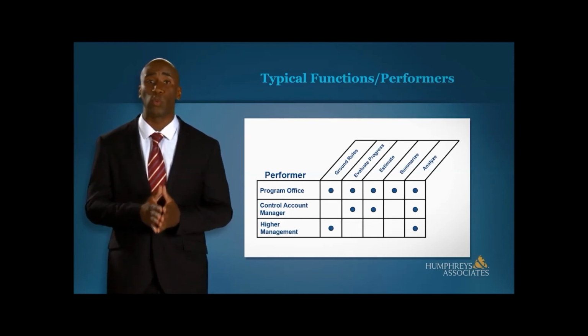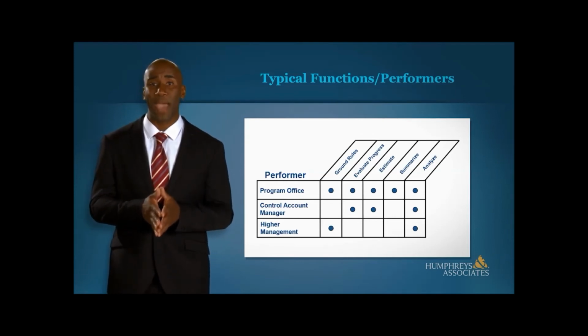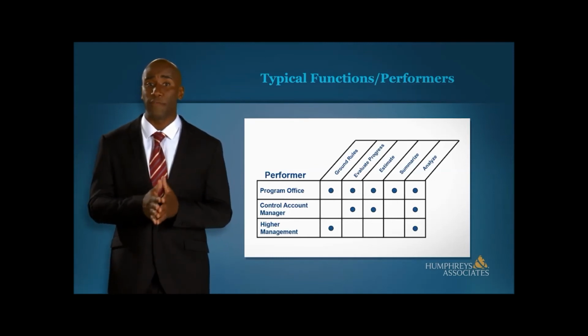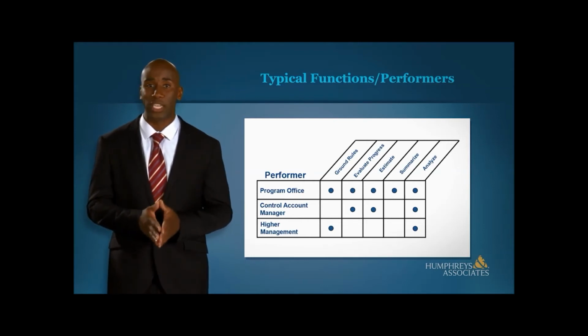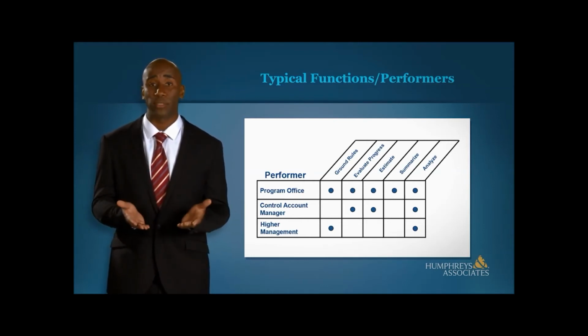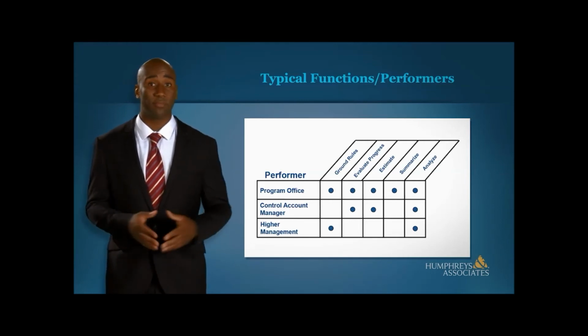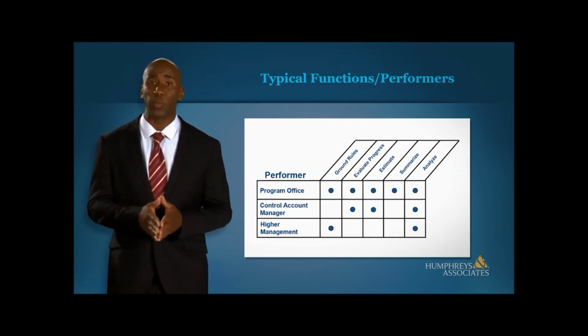This should include important scheduled dates, such as a critical design review, major delivery dates, and contract milestones. Any risks in the schedule that could impact the EAC should also be documented. Then, other factors need to be considered, such as what rates will be used. Will a fiscal year boundary be crossed because of the scheduled forecast dates? If the rates are going to change, how much for increased salaries? 2%? 6%? Changes in rates will be a part of the rationale for the EAC change.